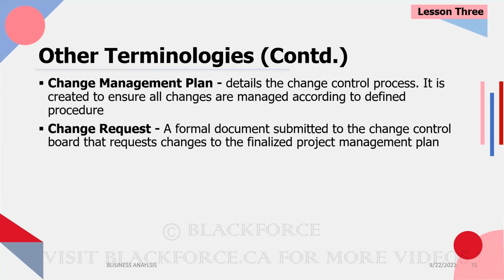Oh, if there's a change request, it needs to be documented. It's submitted to the change control board every Thursday. The review time takes about a week, meaning within 2 weeks, we should be able to let the business know of the decision.